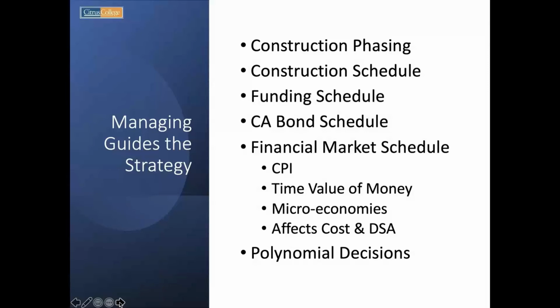There have been districts that, when the economy is bad and maybe they are going to get funding from the state, but possibly it's too many years out, realize that with the time value of money, even if I did get state funding, it still would give me less to build with than if I financed it today myself. So those things are all very, very important things that you have to think about.